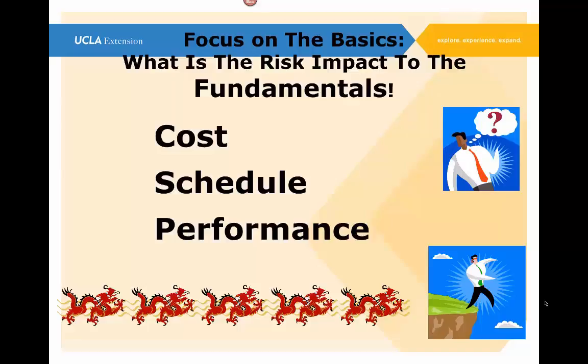That's extremely important, because if we go beyond the performance requirements of the project, what we're doing is really going out of scope, and we're spending budget and schedule time on additional capability or additional performance, which is not required and not specified. It may seem prudent, but if it is prudent or if it is really needed, then we have to go through a process and have a formal change authorized and approved for the project, because that will impact our cost and our schedule.